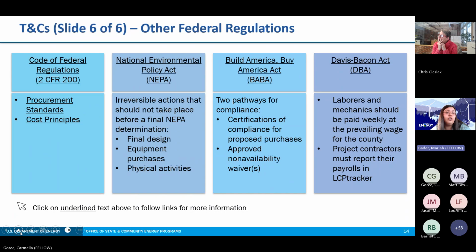This is where you will refer to all standards of your award and all the cost principles that are sectioned to it. Next is NEPA, where we wanted to highlight the irreversible actions that should not be taken before a final NEPA determination, and that is final design, equipment purchases, and physical activities.